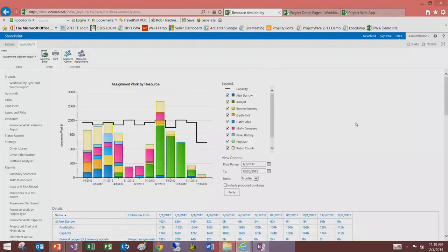What we see, and this is typical in planning cycles, rolling wave, is we have a gap period where we've got the next 4 months planned, but the 2-3 months after that we really don't know. And then we're starting to get a lot of demand for new work, which is this green role, the analyst. Remember that? So as people are filling in those resource plans, if they're doing that consistently, you're going to start to see your demand go up, and you're also going to see a little bit of it in your current period, right? Remember that the current project we had to do, that work is going to start to show up here, so we can start to see if our capacity is overlaying our demand in some way.